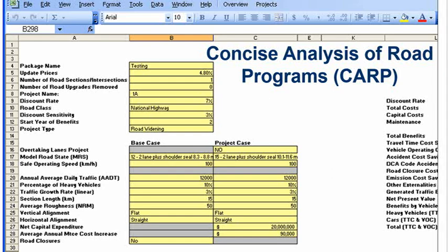Some of these things made the analysis a lot easier to do, because a lot of this other stuff was very data intensive, and we didn't have the time or the budget to acquire all of that data or even do the analysis for all of those. And we've got it within one model, so we keep that consistency. That is quite good. The model has been tested to be within, I think, 10 to 20% of what you get with the detailed analysis.